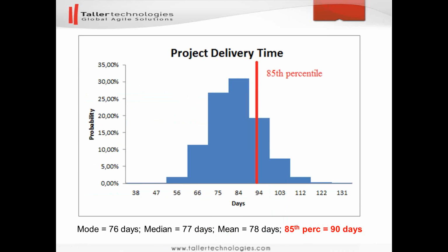So in this leg of the Z-curve, we have experiments, things that we try, sometimes maybe a design to be prepared in order to convince the client that our approach is sound. So it is up to the team to decide. Based on the decision for the first leg, if one of the experiments is a success, then our path will be clear and it will be just a sustainable pace, let's say 70 items. It will be just work, right? That's how we do it.